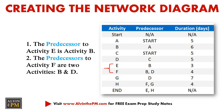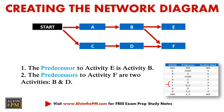And here's where it may get a little tricky. The predecessor to activity E is activity B, and the predecessors to activity F are two activities: B and D. Once we update our diagram with these two connections, we can see that we're starting to have multiple convergences into activity F — meaning activities B and D both feed into activity F.